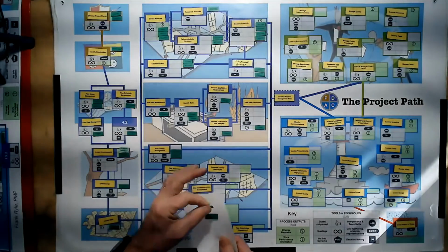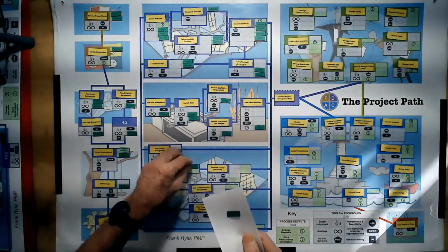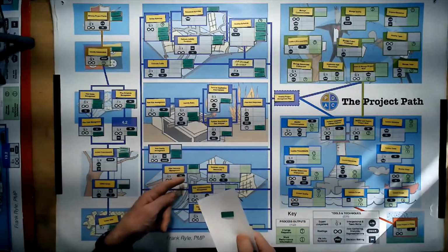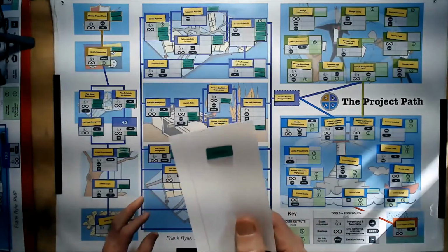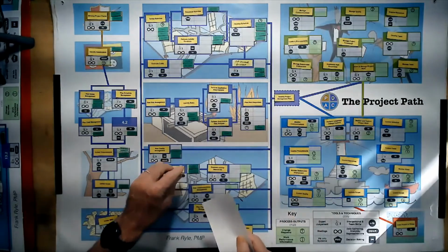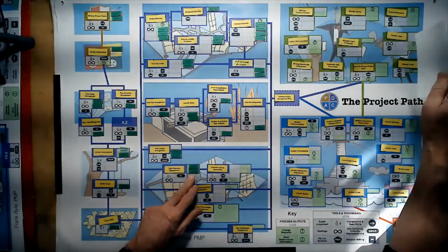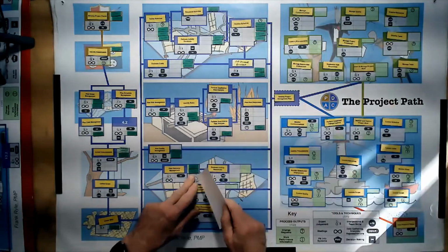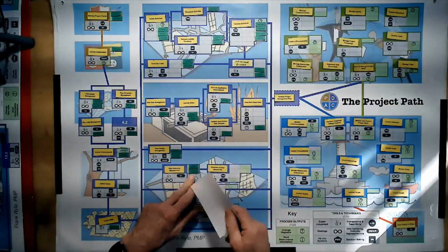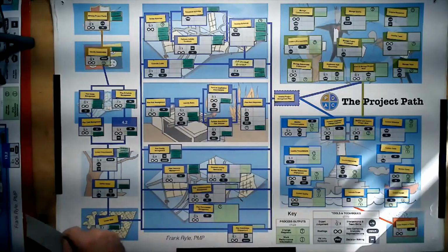And the first one is, of course, the resource management plan. Now, the resource management plan will be put here. It's the output of plan resource management. It makes sense. It's on the label. But the other one that's interesting here is called the team charter. Now, the team charter is maybe a draft at this stage, because remember, we won't have acquired a lot of the resources until we get into execution. And so the team charter needs to be something that's negotiated amongst the team members. So therefore, this is a starting document, but not necessarily the final document.